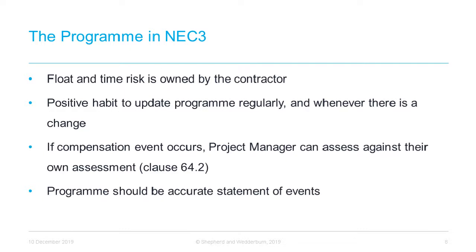If the contractor has built time risk allowances into their programme and a float for particular activities, and a compensation event has an impact on the critical path, they do not lose the float. Indeed, building float into a programme is not a reason for the project manager to reject the programme. This is not to say that the contractor would not be under commercial pressure to remove the float. However, the contractor is entitled to resubmit the programme on the basis that the rejection was not valid.